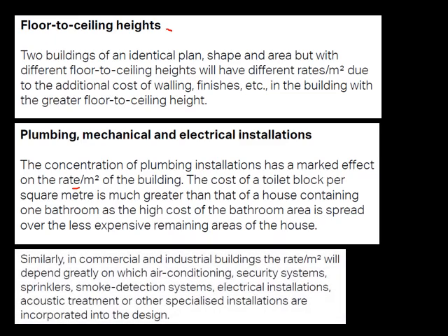Then similarly, the commercial and industrial developments, there's a big difference between developing a nuclear plant in comparison to a normal house that you're building. The cost, that's the two extremes almost, if you want to call it that. So obviously industrial development might be cheaper if you've got big storerooms, but if you need to refrigerate those stores or put in air conditioning for that volume, it may take up the cost quite a bit. So those are the things that you need to look at.